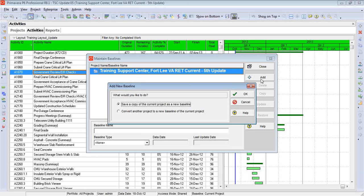Why would you do that? Let's say you're getting ready to make some changes, but you're not sure if they'll really work out. We can make a complete copy of the schedule, and then as we're modifying it from this point forward, we can compare our changes to the baseline. Or if this was the original baseline schedule on the project, we can make a baseline of the baseline. Then as we start modifying the current schedule to become the first update, we're referring back to these target bars, which are the baseline schedule.